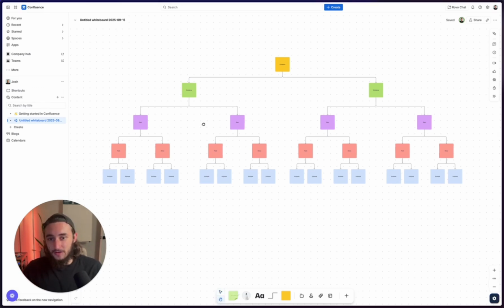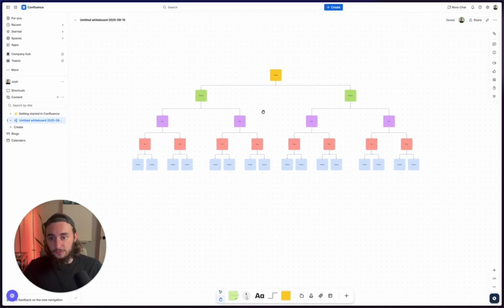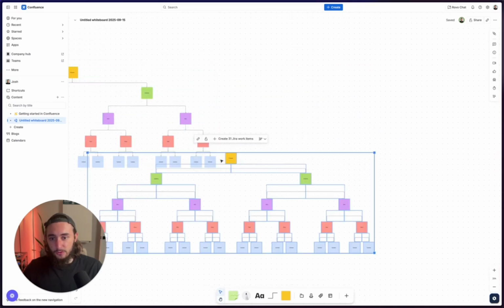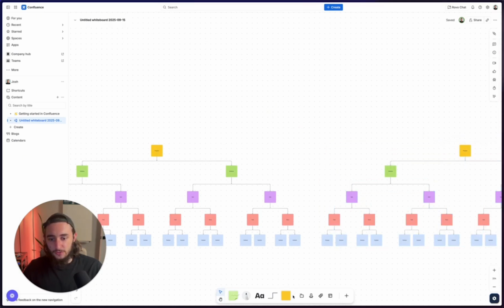So that's why you don't want a lot of these hierarchies, especially when you're doing a lot of things that require a lot of subtasks and tasks, so you have so many work items to actually deal with. For example, if you had more programs and then multiple programs rolling up into something else, you'd have a whole bunch more hierarchy levels rolling up into a new work item, which then spans across multiple programs. And the more of these you have, the more complex it gets. So again, my recommendation here is to stick to 5 to 6 at the most. A good rule of thumb is having your subtasks, your tasks, your epics, and then your initiatives. I don't find use cases often for programs or above that. That being said, every organization is different and you may find some use case for it.